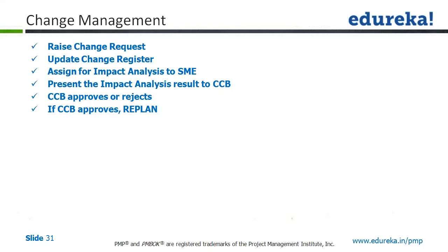So once we raise a change request, the change register gets updated. We also look at the impact this change is going to bring onto the various other processes. And we also involve the subject matter experts to look at whether the changes which we are going to bring in would lead to any such impact onto the other processes.